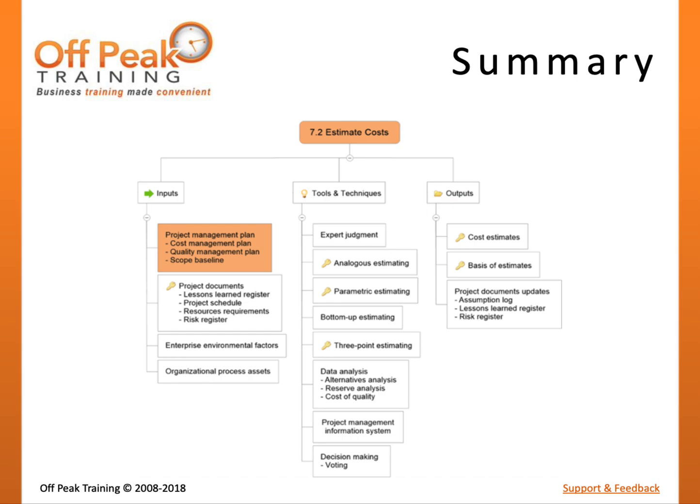This process can be performed iteratively through progressive elaboration to make estimates more precise. The first iterations may develop a rough order of magnitude estimate, while a second iteration may develop a definitive estimate. This should also include documentation on what assumptions have been made and what spending alternatives may exist.